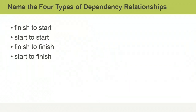The four types of dependency relationships are: finish to start, start to start, finish to finish, and start to finish.